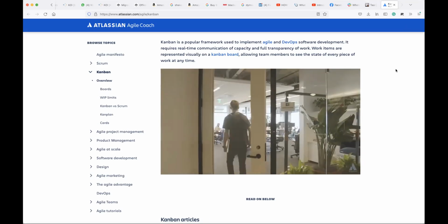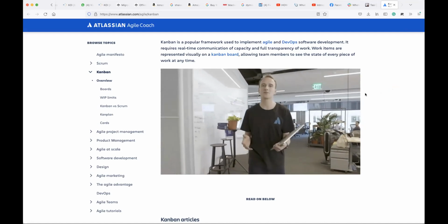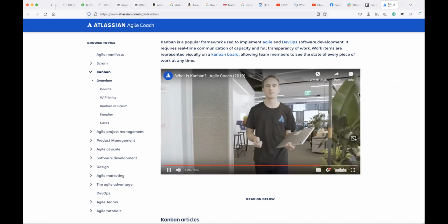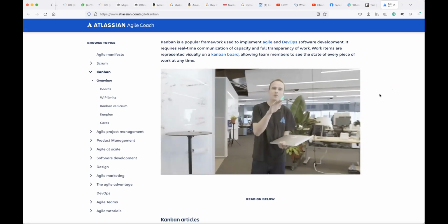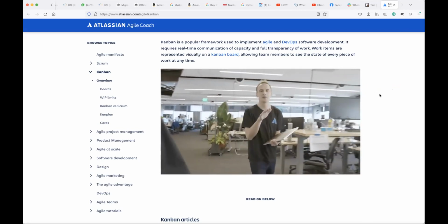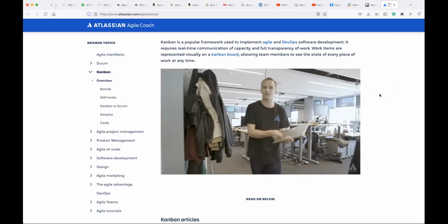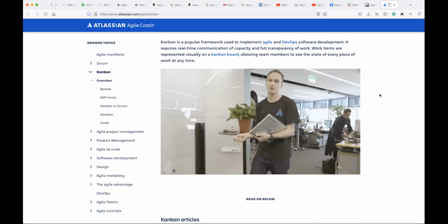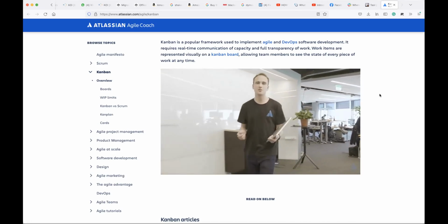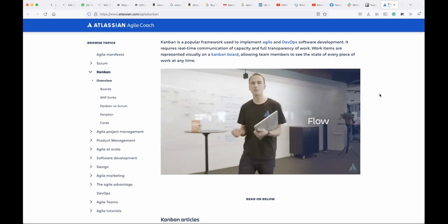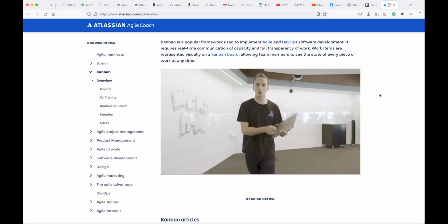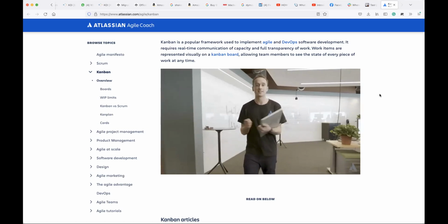Once you build a board and you fill it with cards, you'll start to realize one of the key benefits of Kanban. You'll see columns that start to bunch up, revealing a bottleneck in your workflow. You'll also get a sense of what size cards your team can move forward in a timely manner. These efficiencies we like to call flow, and Kanban is built to help teams flow work better from the backlog to done.